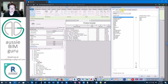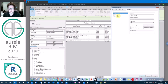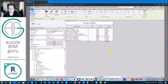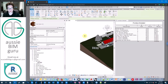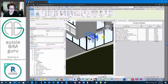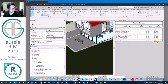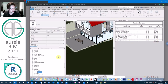If you want to see your grand total — your overall spend on furniture — just turn on grand totals and turn on totals. You can do counts and totals as well if you want to see how many pieces of furniture you have. You can see we have 30 pieces of furniture and $14,220 expenditure total. Because we're in BIM, the beautiful thing is that if we add things to the project our schedule will update as well. If we add another chair and table, our cost adjusts to suit the quantities. This can be maintained in your project as a cost schedule.